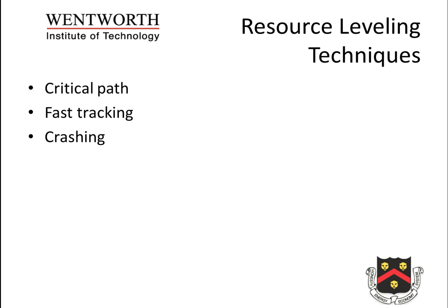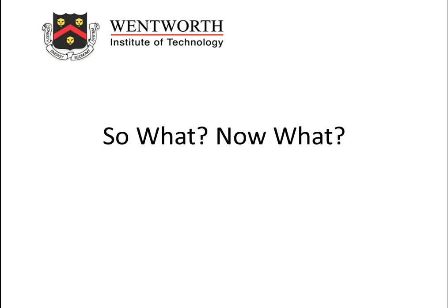This performs critical path tasks in parallel. This buys time. The prominent feature of this technique is that although the work is completed for the moment, the possibility of rework is much higher. Crashing. This refers to assigning resources in addition to existing resources to get work done faster, associated with additional costs such as labor, equipment, etc.